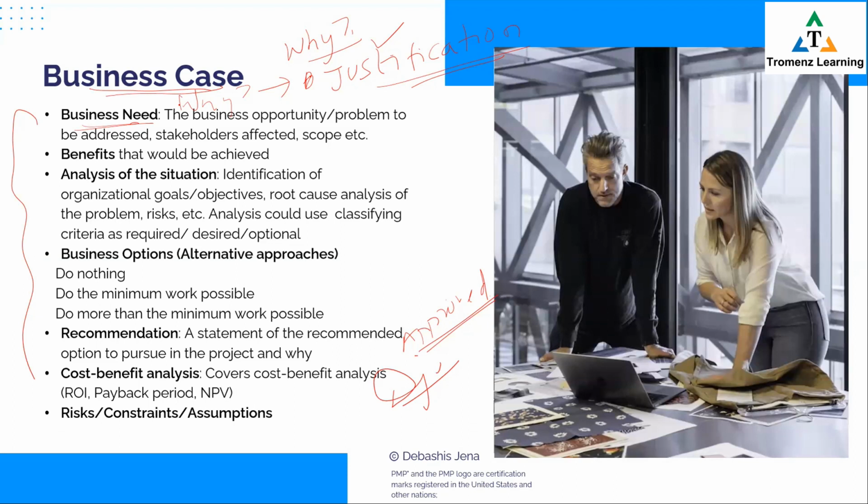Thank you. Just wanted to add, benefits are financial and non-financial. Please note, not only financial. Improved customer satisfaction, CSAT, is not a financial one, it's a non-financial one. So in a project we have all types of benefits. And one thing, benefits are best quantified wherever possible. Like, improve CSAT by 10%. If you don't quantify, then what's the target? We don't have a target. So it's best to quantify the benefits. So you have the listing of benefits, a very important section of the business case.